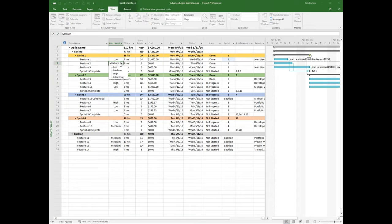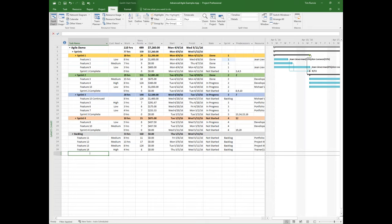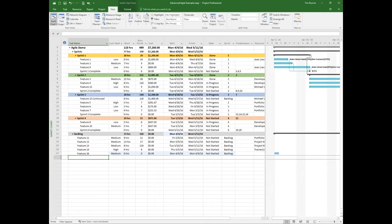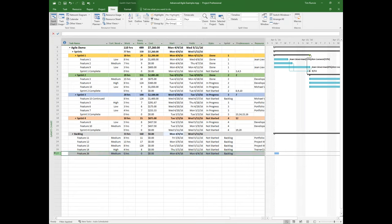So if you take any of the fields, I always recommend that you come in and you rename that to be what it is. In this case, I called it customer need. It's kind of hard to remember all the different fields that you may have. If I click on lookup, I can actually choose low, medium, low. And if I want to put in here, this is extra crispy and that's going to be my new field. And I can choose a default value that says, let's set the medium to default. You can just check the box, pick whichever value. And that means as you add new activities across the board, you can actually see those. Again, that now means I can come in here. I can pick. Here's my dropdown. And I have a unique way to sort, filter, and group.